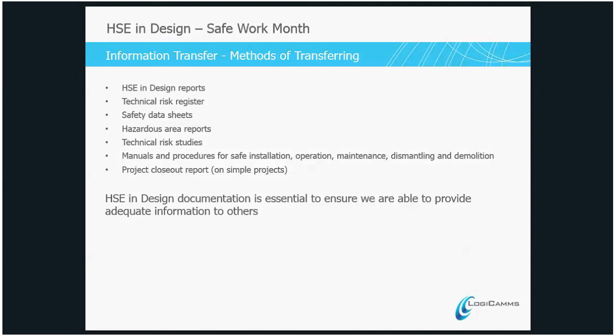I've seen it done on a large civil project where we went to site and spent a few hours with the constructor and the client, went through the risks associated with the civil works, and the set of minutes that were produced at the end of that was used as a method of transferring the information and all the known risks to the other duty holders.